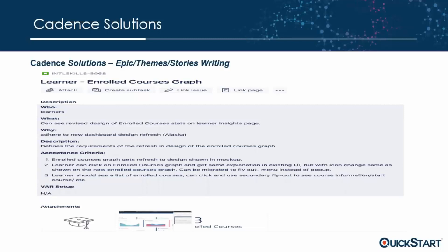These are important sections to define within a story. You may want to add or remove items, but based on my studies with Mike Cohn, this format is very useful — not only for understanding what is being asked, but also from a QA perspective. From the QA standpoint, you can take the acceptance criteria and turn them directly into test cases, then execute on them to make sure every single acceptance criterion has been met.